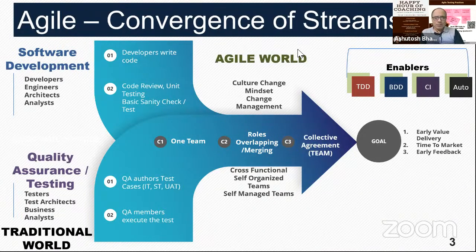So I would say that the agile testing concepts have to be reiterated right from the first day of your release. It is not something which you can do later, because otherwise you will end up having waterfall in a sprint, which means mostly the first 8 days you do development, the next 2 days you do testing, which is nothing but a waterfall project just under the cover of an agile container or a wrapper, if I were to say. So again, my recommendation is to train them from day 1 itself, rather than waiting for a longer time.